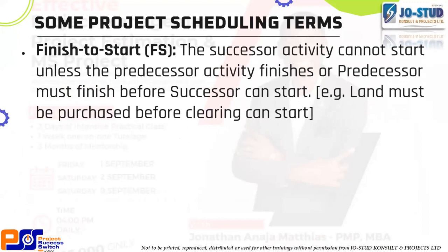Finish to start means the successor activity cannot start unless the predecessor activity finishes, or the predecessor activity must finish before the successor activity can start. E.g., land must be purchased before clearing can start, right?